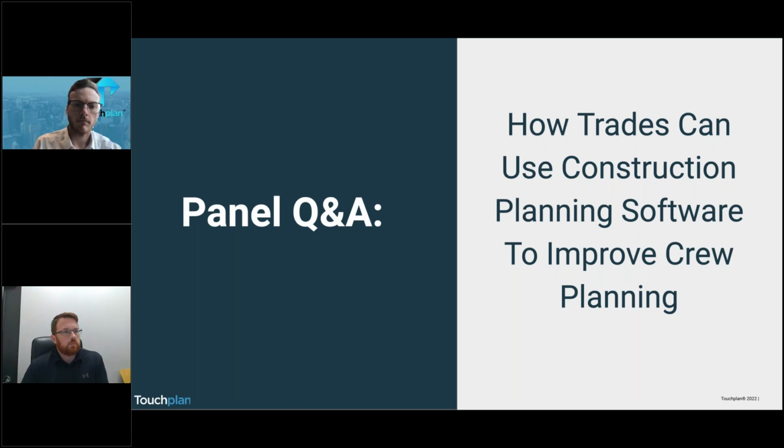It's nice to just show the general foreman, hey, now that we're looking at this, what do you guys think? Let's move this. It's like, well, this is obviously not going to work. Let's level it out. And in real time, it changes the crew size up top, right? That's a big deal, and probably for Chase too: where are these spikes coming from? Where are these lulls coming from? We can really see it. Like, that's not going to work, guys. We can all see that. And so let's adjust it and level it out.